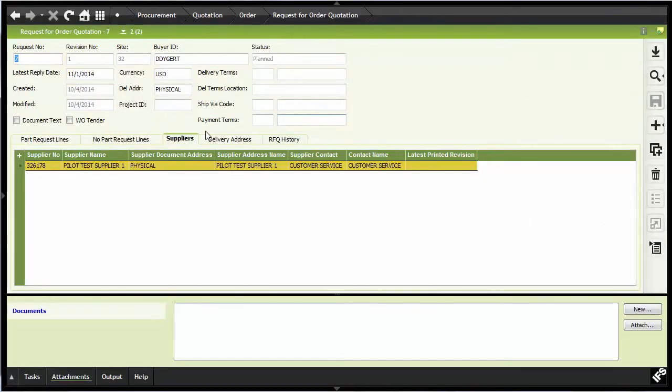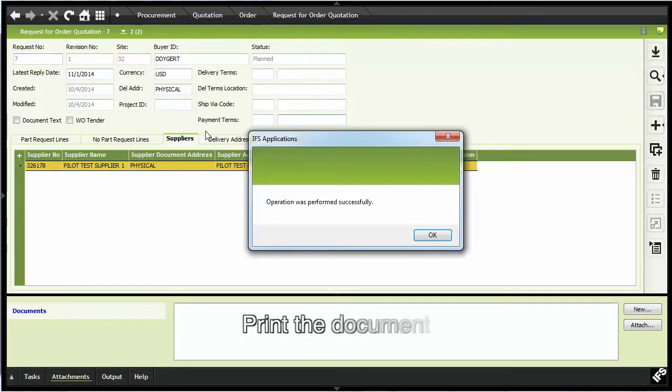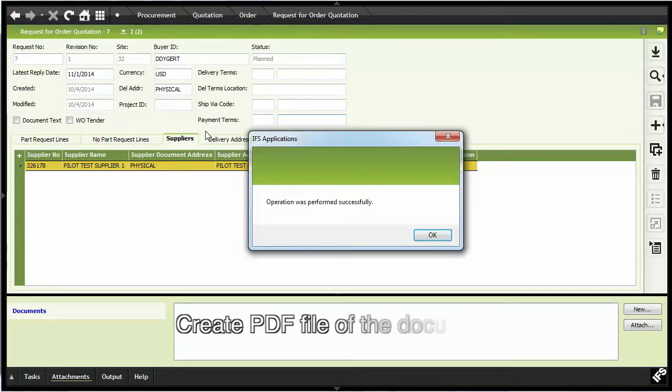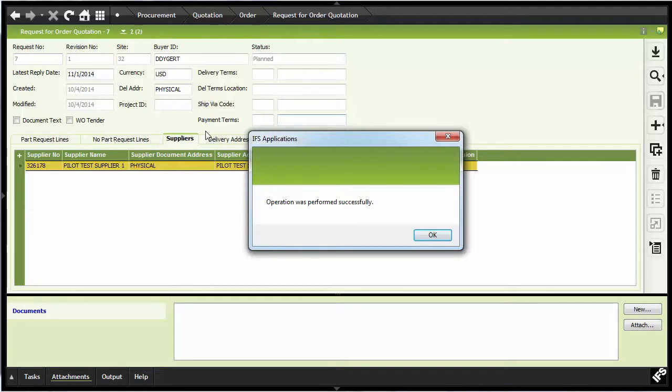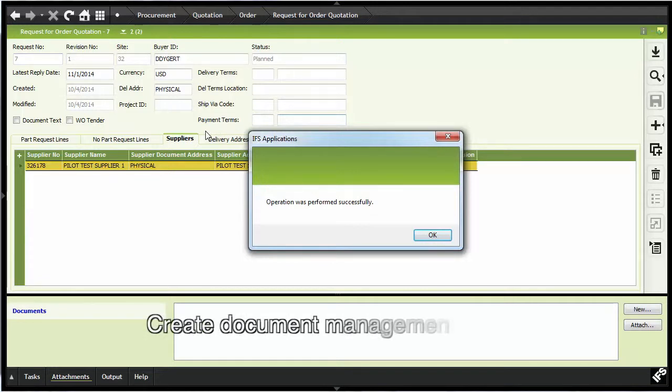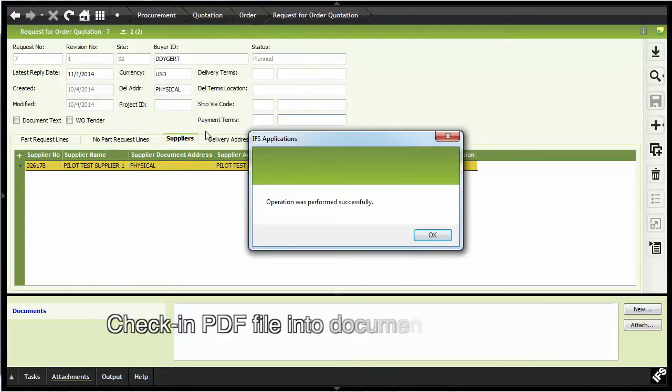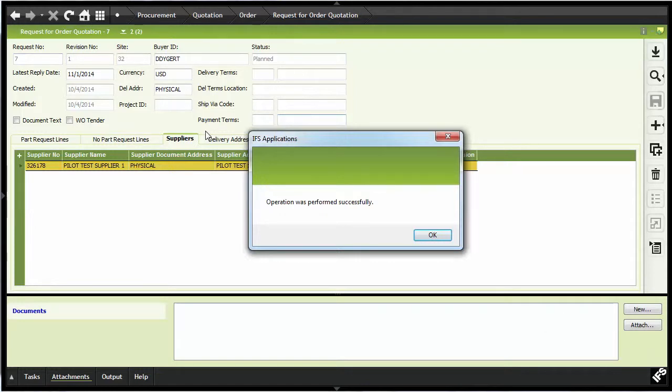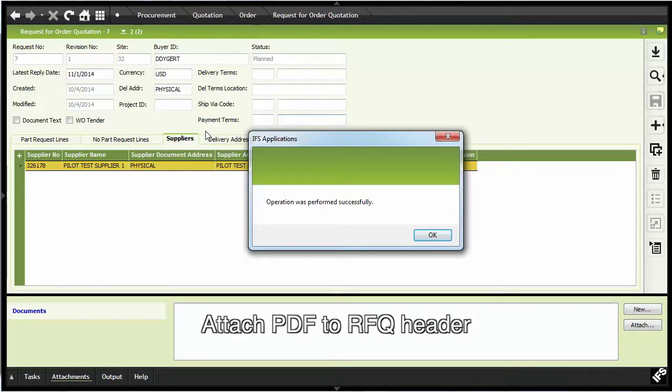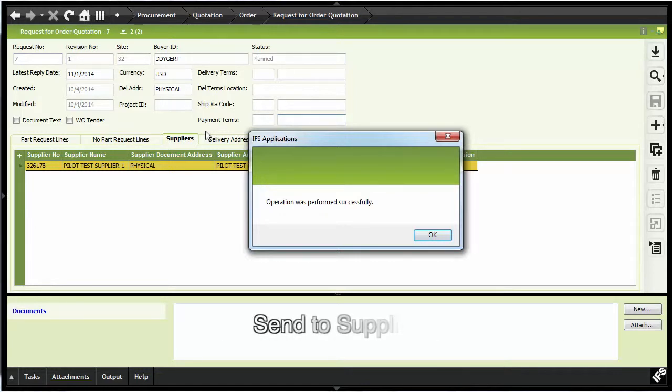What this process is doing automatically in the background is creating a request for order quotation report, creating a PDF file of the report, creating the document management record, checking in the PDF file, attaching the file to the RFQ header, and then electronically sending the request to the supplier.